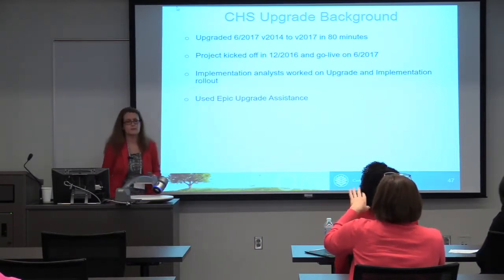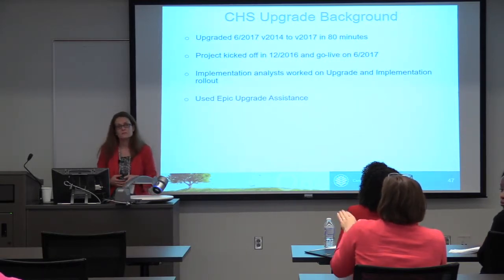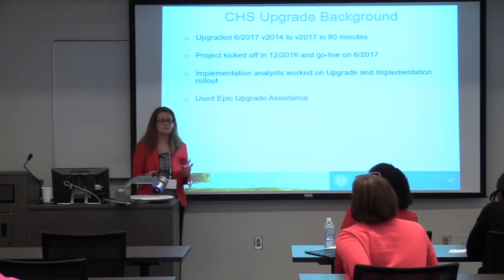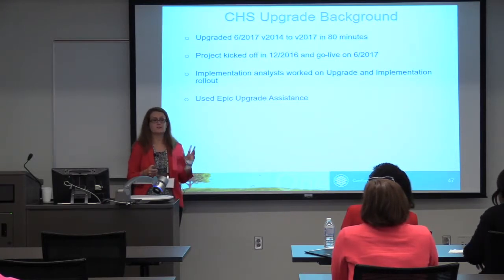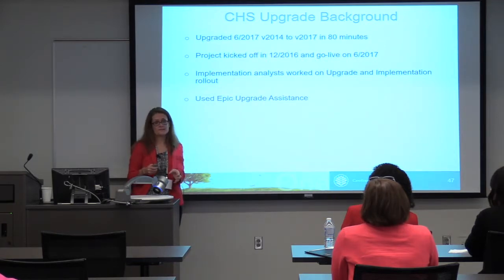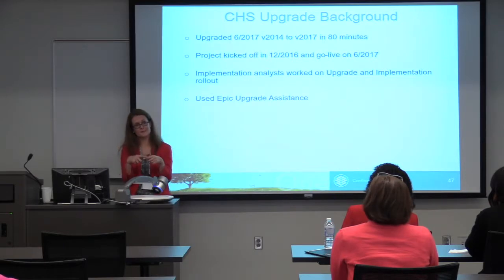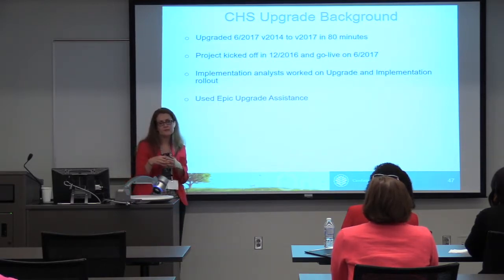I don't know if you're going to talk about it anymore, but what's the main difference between the upgrade assistance and just the TS that each team has? Yeah, so our TSs are full-time, or as needed for us. Upgrade assistance was additional resources to really focus on helping us specifically with the upgrade. Our TSs and the upgrade assistance folks had to work together because we didn't have normal Epic workflows happening, and they weren't up to speed enough to know what we really needed. So they had to work together on that aspect.